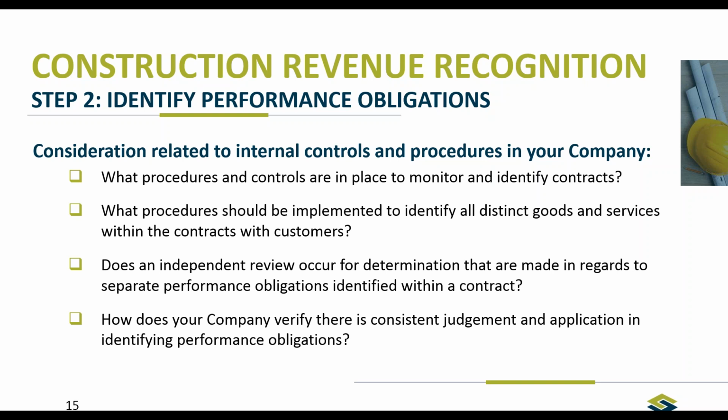One of the things I'm advising a lot of my clients is, since this standard is effective January 1st, 2019, for all the jobs you're currently entering into that you anticipate will go beyond this year, 2018, into 2019, perform the assessment and go through the process of these first two steps, because that's really going to be the baseline for determining steps 3, 4, and 5.